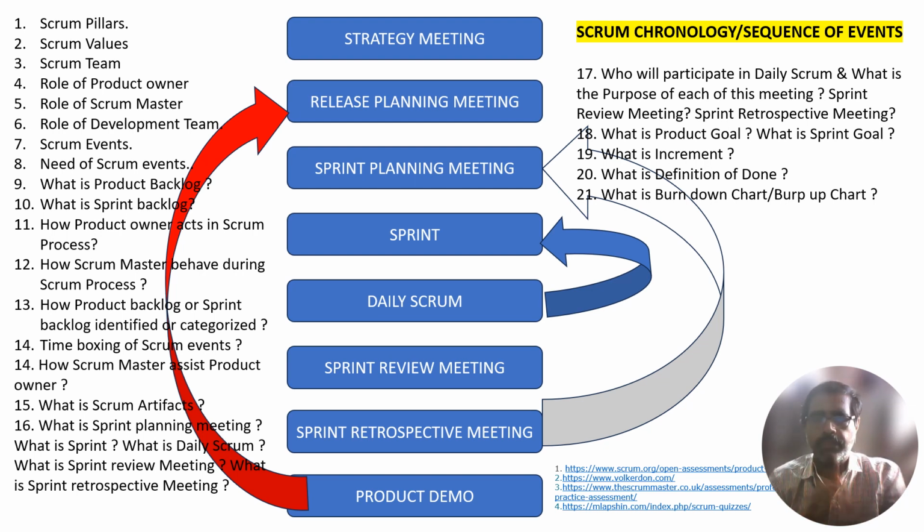When considering why this sprint is valuable, the product owner proposes how the product could increase its value and utility in the current sprint. The whole Scrum team then collaborates to define a sprint goal that communicates why the sprint is valuable to the stakeholder. The sprint goal must be finalized prior to the end of the sprint planning.